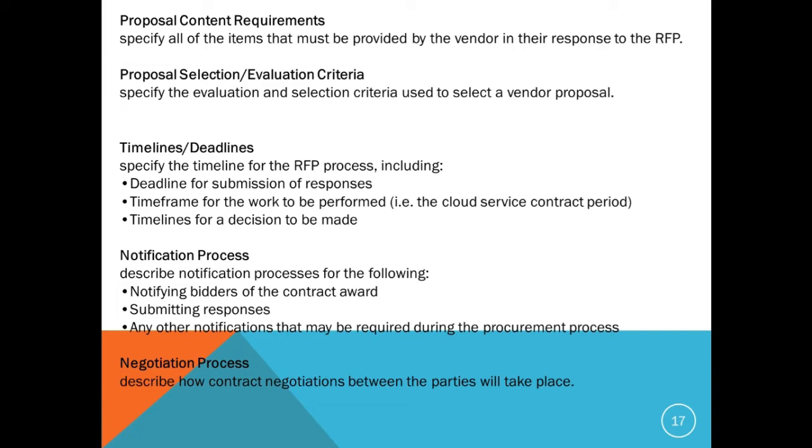what is the primary thing you are looking for? Are you mainly concerned with technical expertise, or are you looking at cost considerations? You need to specify what your priority is. Though the company is looking for all the things, among technical, managerial, and cost, which is your main priority and what you are mainly concerned with, you need to specify here. When the vendors submit the proposal, they will focus their expertise and put more emphasis on that particular requirement, which becomes the selection criteria or the evaluation criteria.